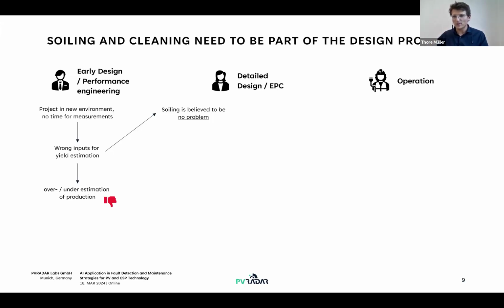Now let's say the power plant moves one step further, and we already are basing our expectations on wrong assumptions. But now our EPC team needs to incorporate a cleaning strategy into the design. They may think that there is no problem. Therefore, a very small cleaning budget is associated to the plant. And then people in operation later find it very difficult with a very small budget to maintain the high expected performance of the power plant. And that, of course, is a problem, because at that point, many of the options that you had during design are already gone.